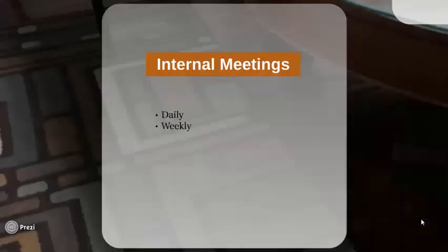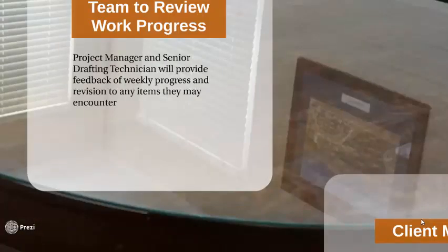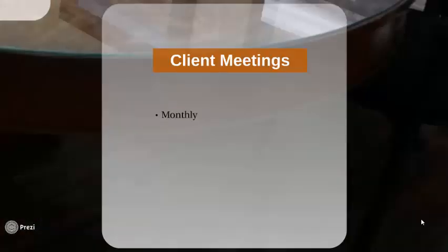The internal meetings will be daily and weekly. The team to review work progress will be the project manager. The senior drafting technician will provide feedback of weekly progress and revision to any items they may encounter. Client meetings. They will be held monthly.